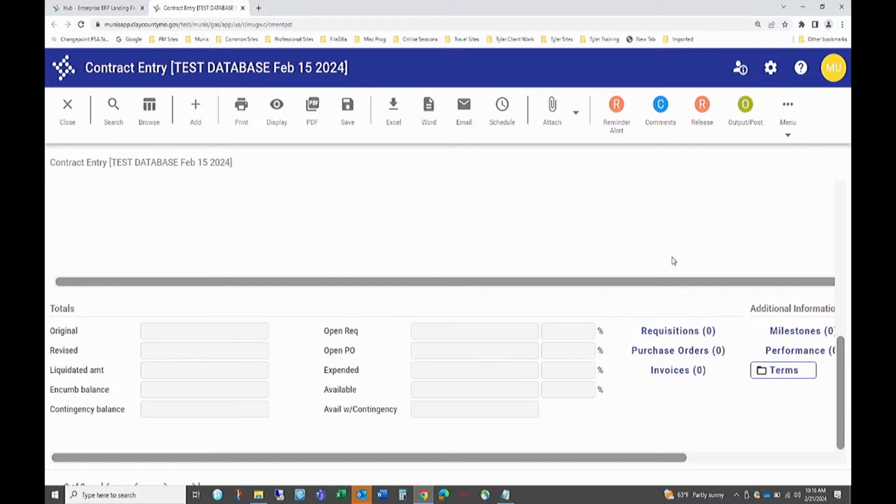Okay. And then the other side over here, on the milestones, kind of like a Gantt chart, you can actually set up to say, at this date, inspection 1, at this date, inspection 2, and you can set contract reviews, retainage release date reviews, pay app dues.